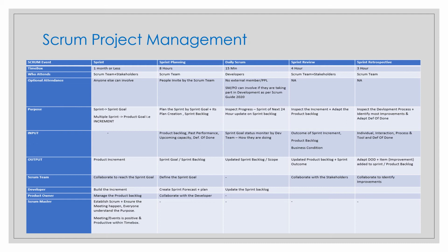It should always be clear what the development team will be working on next, so the product owner is the sole person responsible for managing the product backlog. The product owner needs to make sure that product backlog items are clearly expressed and understood by the development team. And remember, the key aspect is that the development team performs through the managed backlog, and mostly through the order of the items within the backlog.